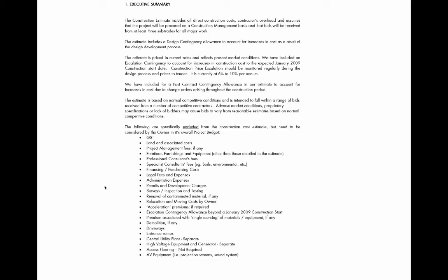It can be, you know, your fees, soft costs. Soft costs can easily be, you can add another 20-30% to a project for sure. These all would be considered soft costs. So, yeah, it can be that, or more even, which is always a shock for some clients.